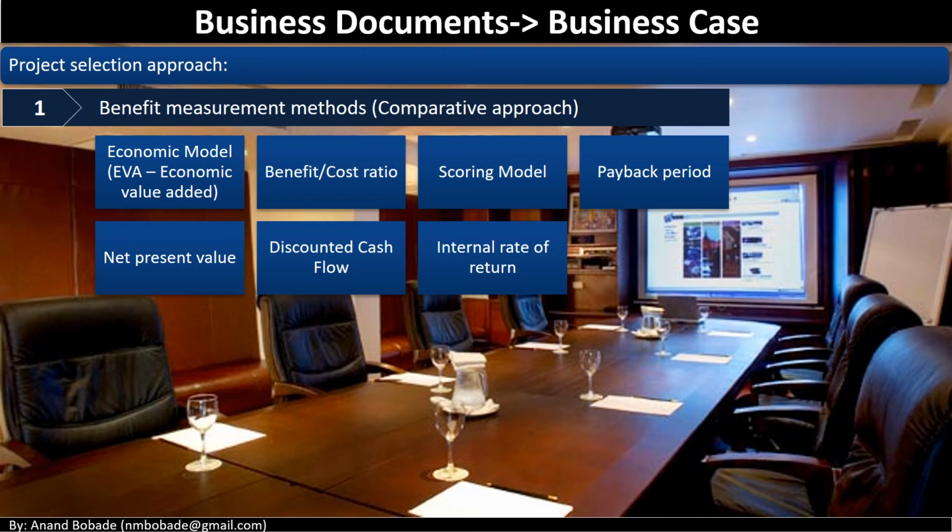And finally, the last one is opportunity cost. Opportunity cost is the cost that is given up when selecting another project. During project selection, the project that has the lower opportunity cost is chosen. So all these techniques will be used so that projects will be selected.